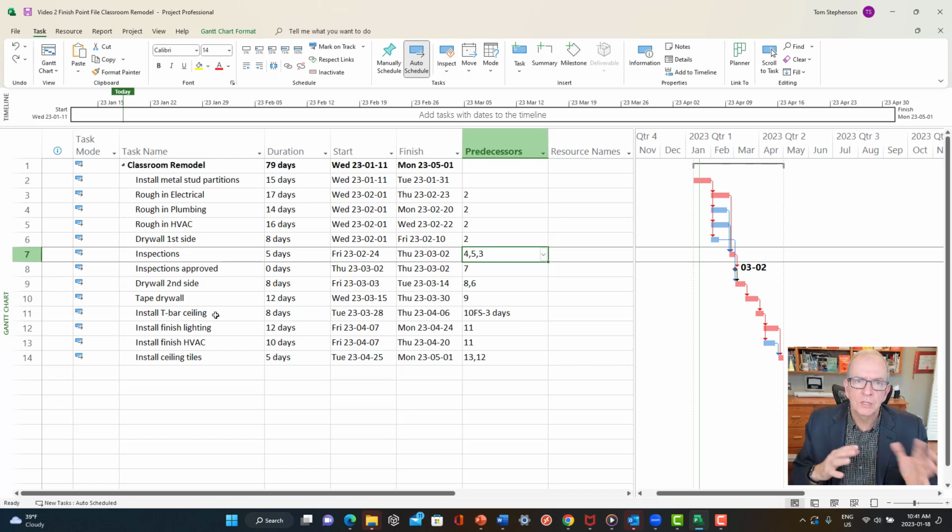If my contracts are different, like in construction, we have lump sum contracts, I would have a pretty standard work breakdown structure for that, but it'd be different if it was like a design build, because now I'd have to include the whole design process. And so that would include headings and information for that.